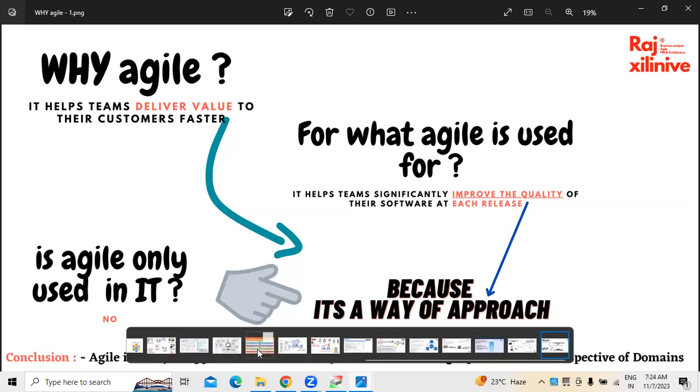It's a group effort. For example, there is a piece of work that was given, and that work has to be completed in a stipulated time. It's a kind of time boxing. Agile is time boxing. For example, a piece of work called a sprint has to be completed in 2 weeks, right? 2 weeks means 10 working days. 2 weeks doesn't mean 7. If you consider Monday to Friday as the working days, 5 into 2 is 10 working days in which it has to be completed.